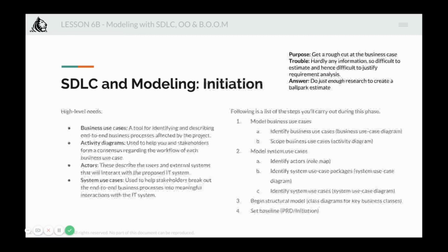The PM assists the project manager by identifying stakeholders, business services and processes, and IT services affected by this project. By the end of this phase, key functionalities are identified, such as key system use cases, user tasks, IT services, and everything. When a non-agile process is used, these requirements are baselined and subsequent changes to scope are managed in a controlled manner using a change management process.